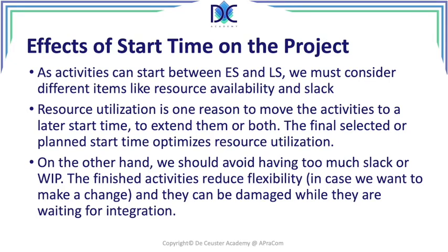reduction. On the other hand, we should avoid having too much slack, like I said, or we can call it WIP. WIP is too much work that is being done that is waiting to be completed. Now, when we have those finished activities, we reduce the flexibility. If we make a change, it's already been done. So we have to redo the work that we did before and we are losing money.